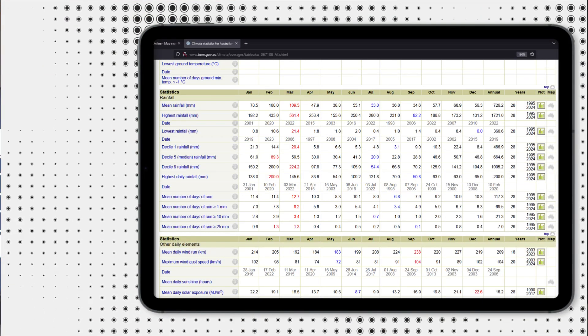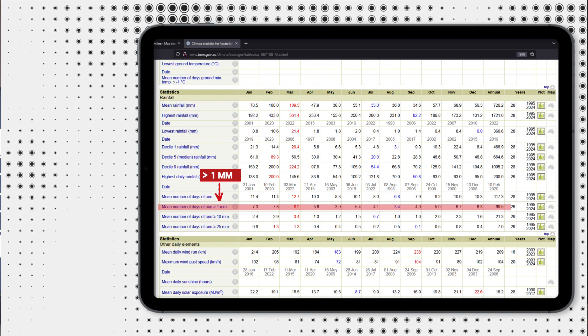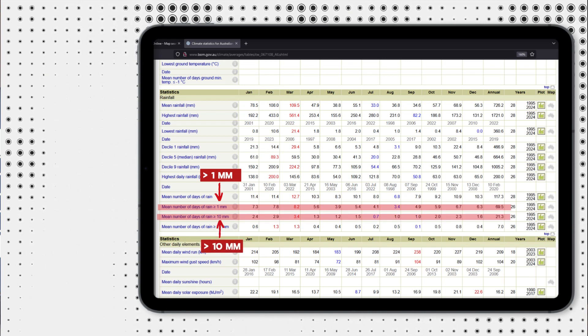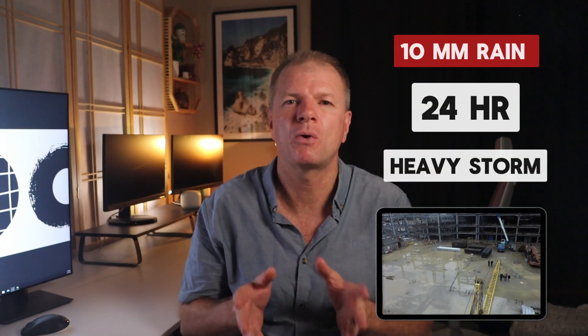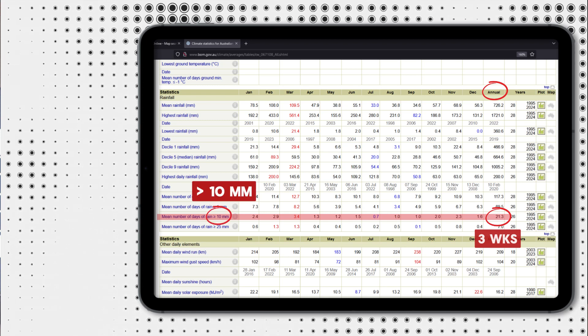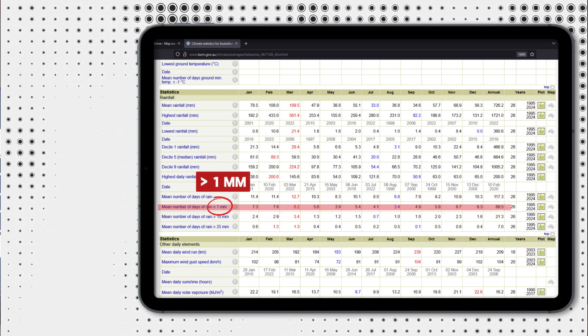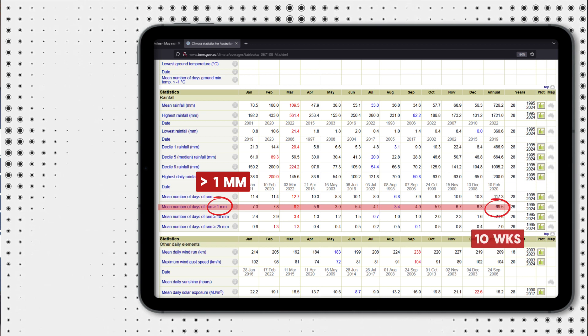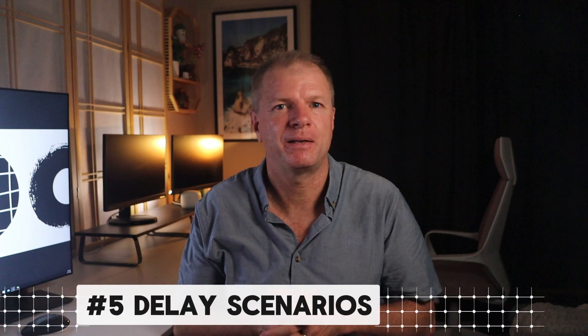The BOM records the average number of days where rainfall exceeded one millimetre and also when it exceeds 10 millimetres, for a given month and for the entire year. A 10 millimetre rain event in 24 hours is considered a pretty heavy storm and may require a day or two for the site to recover and dry out. This data tells us that three weeks in the year received at least 10 millimetres in a 24-hour period. For events of at least one millimetre, there are 68 days or 10 weeks. Using these statistics as bookends and based on experience, for Western Sydney we will nominate six weeks of rain delay — about midway between 3 and 10 — which is about 12%.